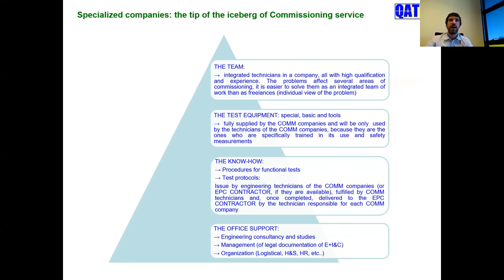For instance, a suitcase of CMC for secondary injection of relays has a cost of 50,000 euros. So this kind of test equipment entails training, protocols, and a way to use it. And of course, under this team and test equipment are a know-how, procedures for functional tests, and test protocols with the approval of the EPC contractor.